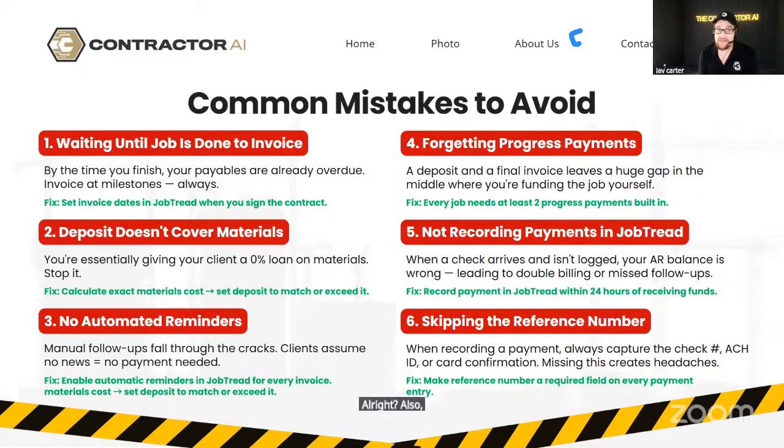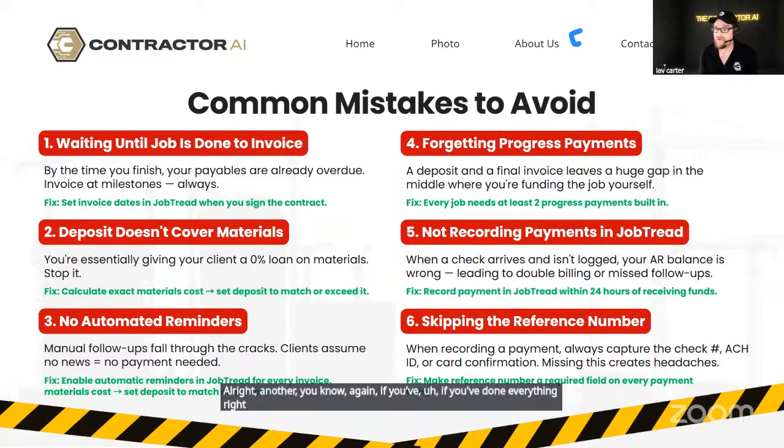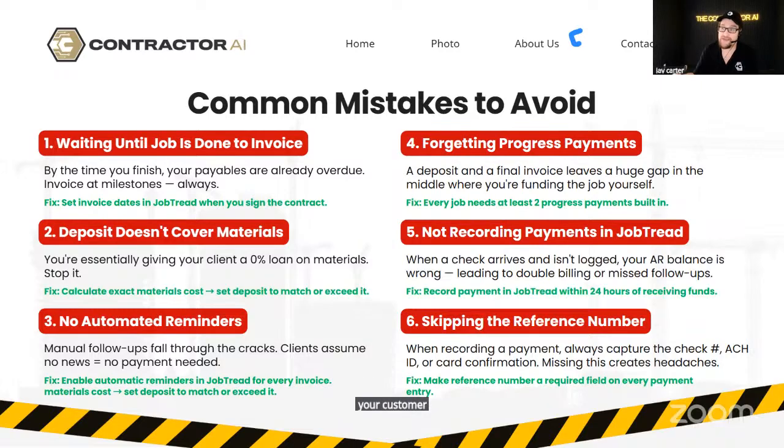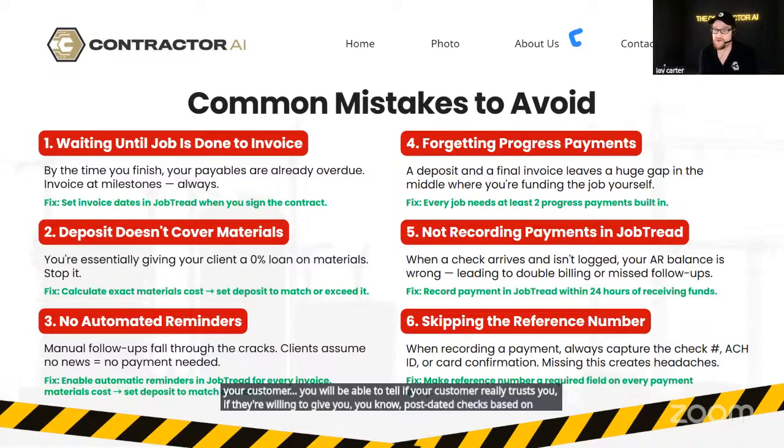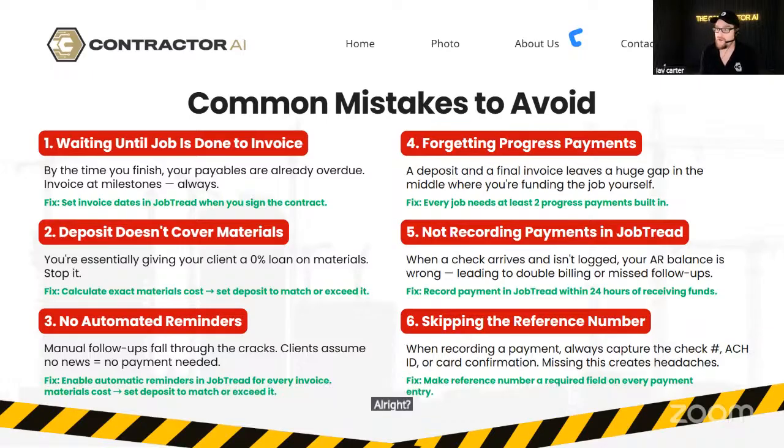Also, I'm going to add to this, making payments really easy. Getting people to give you post-dated checks. Another, again, if you've done everything right in your sales and your production, you will be able to tell if your customer really trusts you if they're willing to give you post-dated checks based on your schedule. And that again works out really, really well. We use it, and it's been no headaches as of yet.